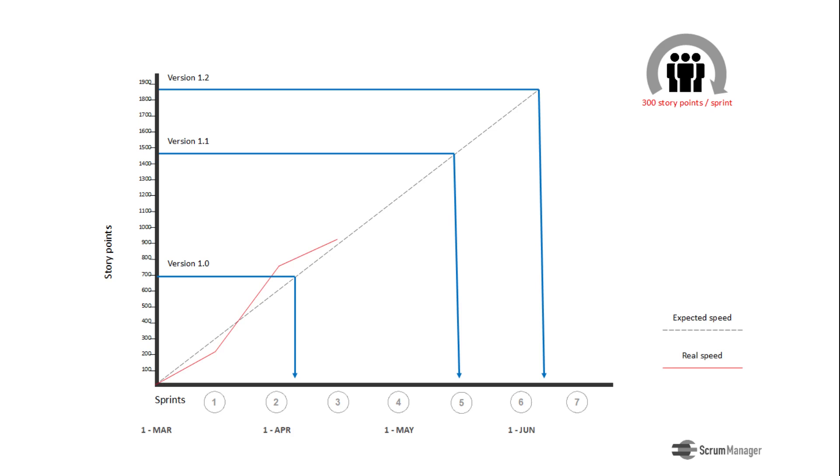In this image, the speed is represented by the red line, which shows the degree of compliance immediately, according to its trend with relation to the expected speed line.